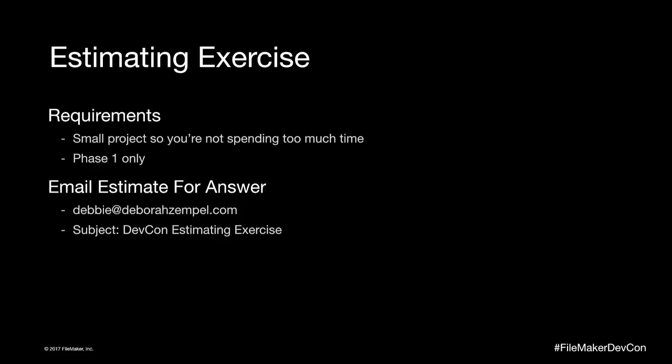But if you get a situation where someone says, oh, I need to do this, and it's like 10, 15 hours additional, and you think that might change the budget, then I immediately say that. I said, we can absolutely do that for you. It's probably going to add 10 or 15 hours to your budget. So if you don't have that, we could replace something else, and then the client can decide how they want to handle that. But I also have that in my contract.